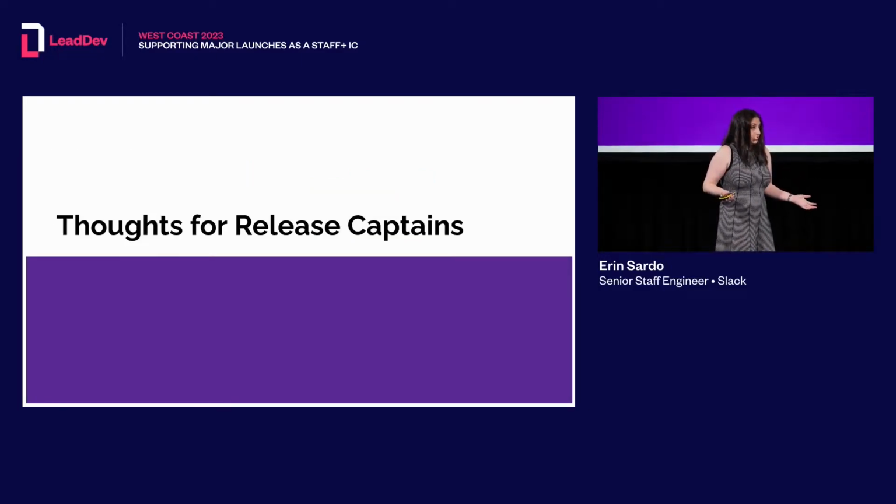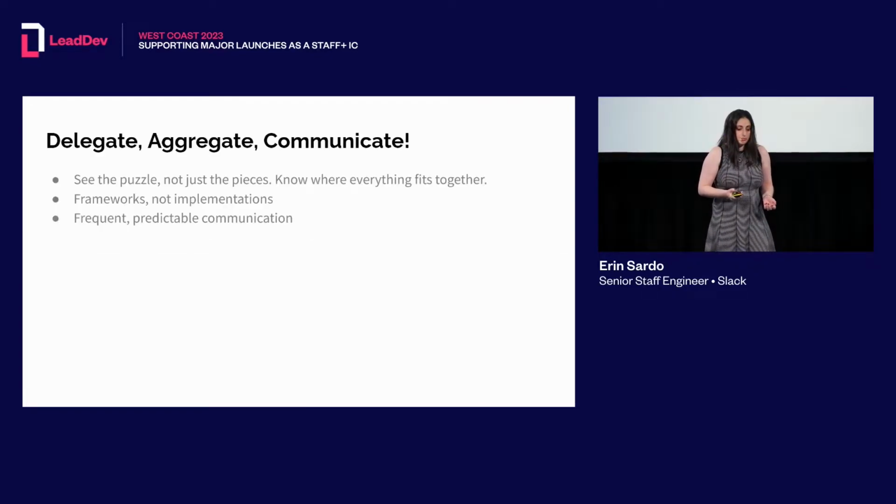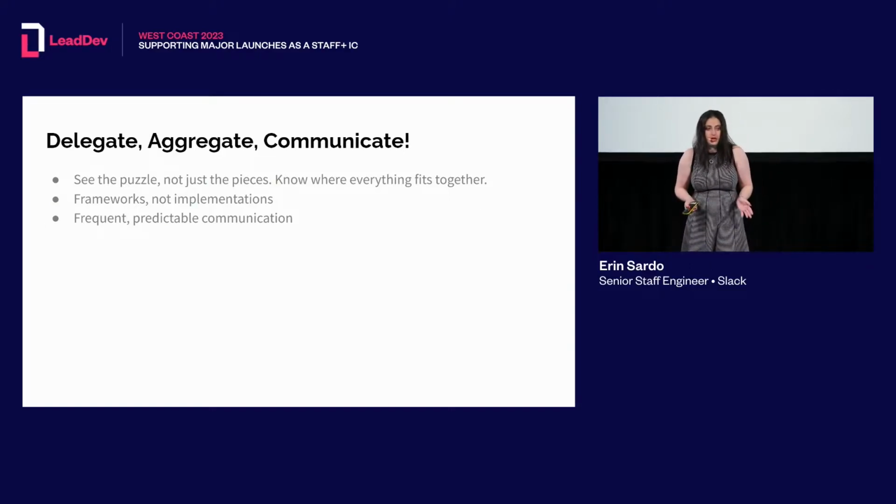So, thoughts for future release captains in the room or those who will be guiding them in the future. Here are some of the things that I've thought about. First and foremost, your ethos. You are there to delegate, to aggregate, to communicate. You see the puzzle, not just the individual pieces. You know how everything fits together. You inspire the frameworks, not the implementations. For dashboards, for flag coordination, your job is to inspire how all these things are going to go out. Please do not fall into the trap of building out the entirety of your health dashboard for the major launch on your lonesome. You will not succeed.